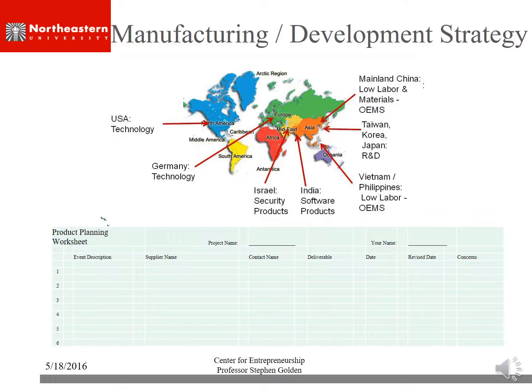And then we keep a list of any potential concerns. You may find a potential supplier in Saudi Arabia that does some really good coffee products, but when you do some research on them, it's a 4-man shop. That's definitely a concern. You may want to do some electronics over in Asia, and you decide Foxconn looks like a really good factory to work with. They're huge. They probably won't work with you. So you need to record those concerns, because eventually you'll use that to narrow your list of potential suppliers. You just need to be sensitive as to where you're going to have stuff done.